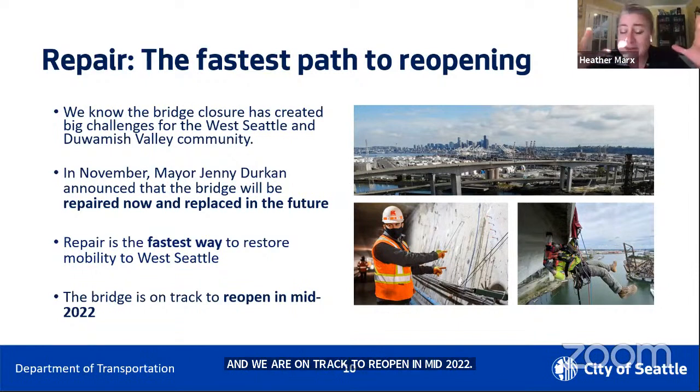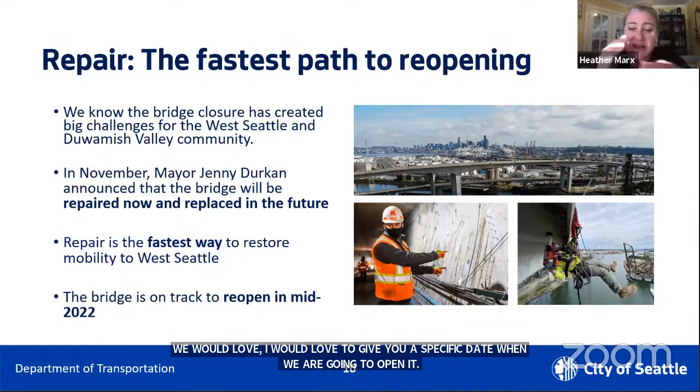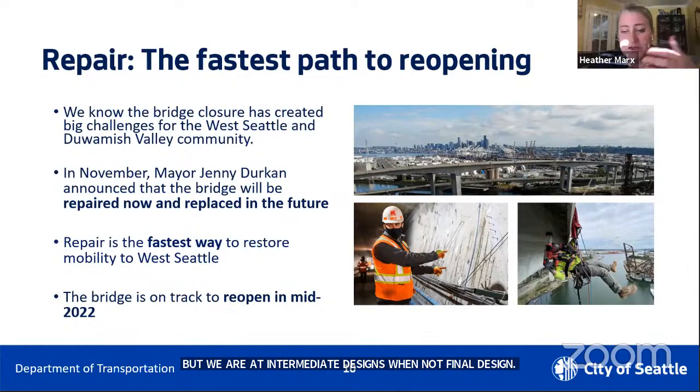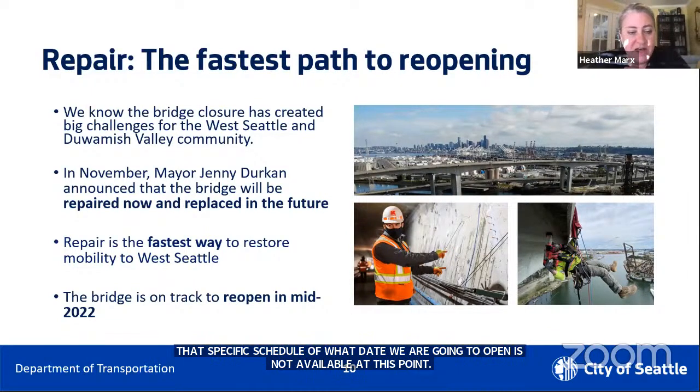We would love, believe me, I would love to give you a very specific date when we're going to open it, but we're at intermediate design, not final design. And so that very specific schedule of what date we're going to open is just not available at this point. We continue to work with our contractors to define that schedule in a very specific and deliberate way. Next slide, please.